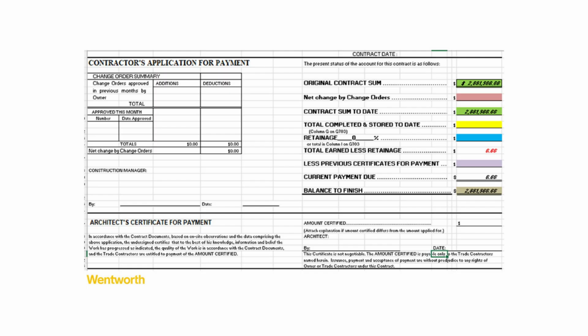This number represents payments that were certified and paid on earlier requisitions. If this is your first application, leave this cell blank. Starting on the next billing cycle, this section will show the total of all prior approved payments.